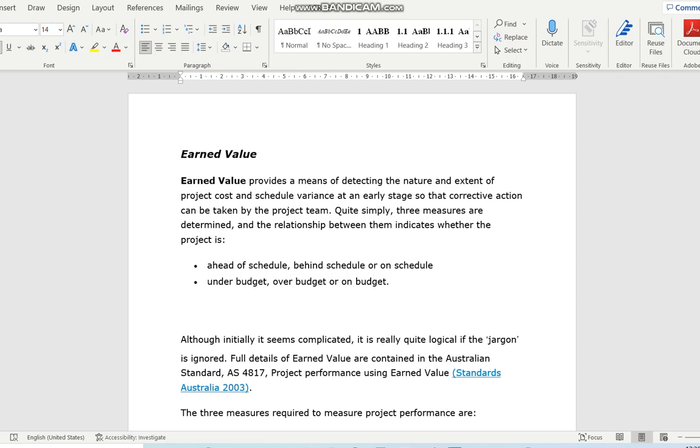So at that point in time, we will have an actual cost of work performed, or sometimes we call it the AC value. So the PV value is basically your S-curve, the first curve that you draw with the techniques that we've taught you. That will show you what is being planned. And then at one cutoff point, if we key in the percentage of work under the schedule and we do the same calculation for physical, we can get our percentage of work performed. And that work performed essentially will be your EV, okay?